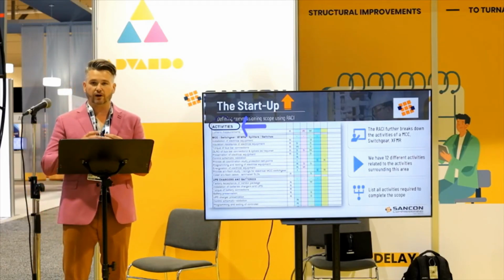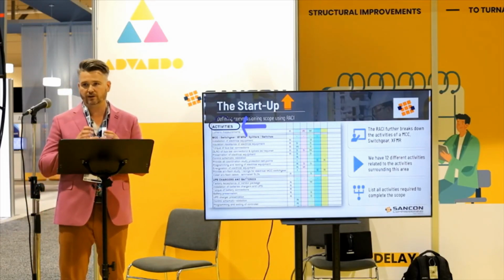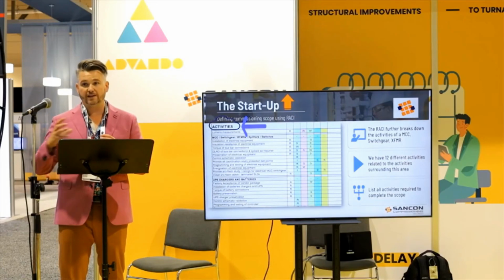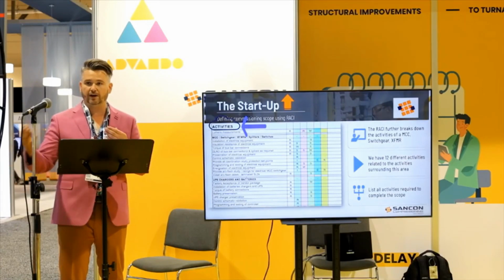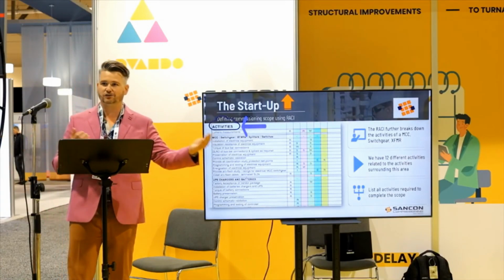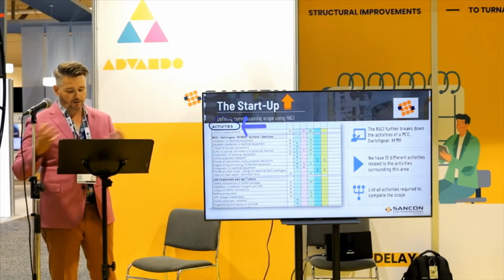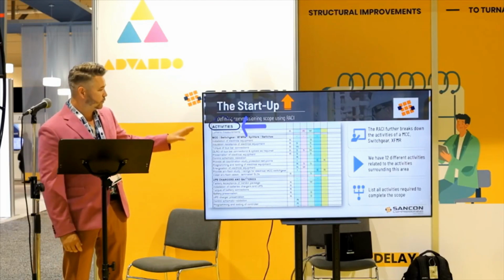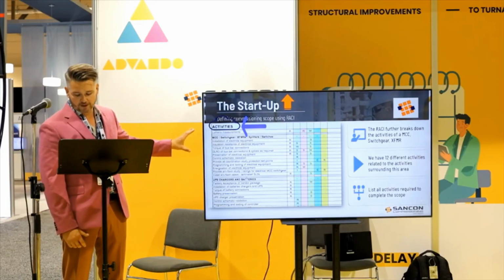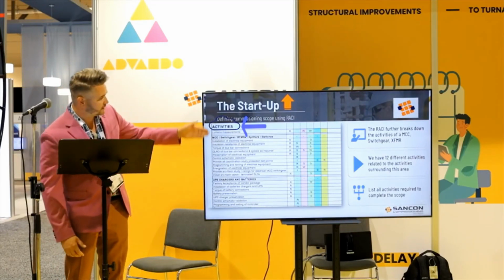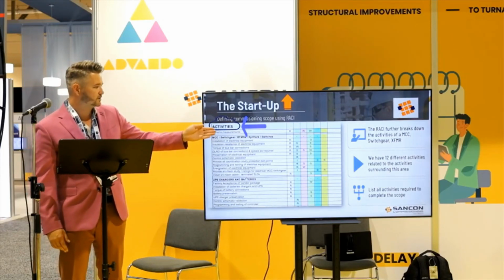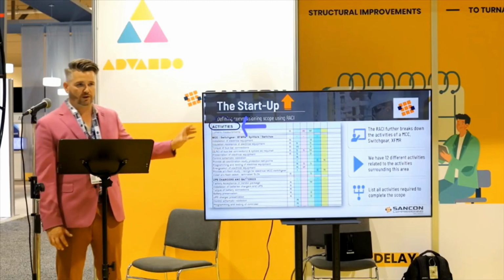Again, we're trying to be as detailed as possible in this responsibility matrix because we don't want to duplicate work that might have been done in a mod yard, might have been done by a vendor, or missed completely because we thought construction was doing it, commissioning thought construction was doing it, vice versa. So we want to make sure that the different activities here, you can see we have 12 different activities related to one specific piece of the project. All these different activities have different responsibilities, supports, accountables, witness, hold points within the scope of work.